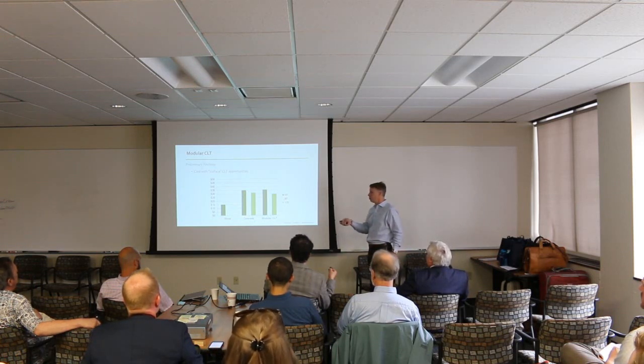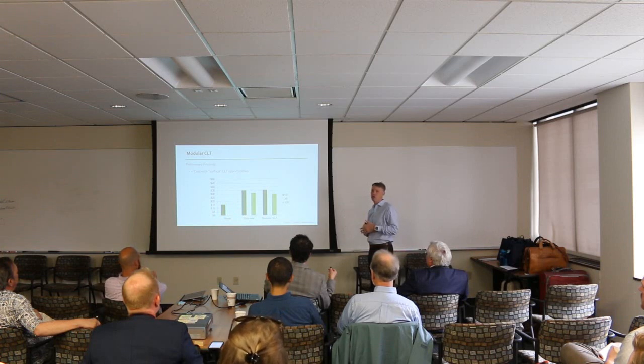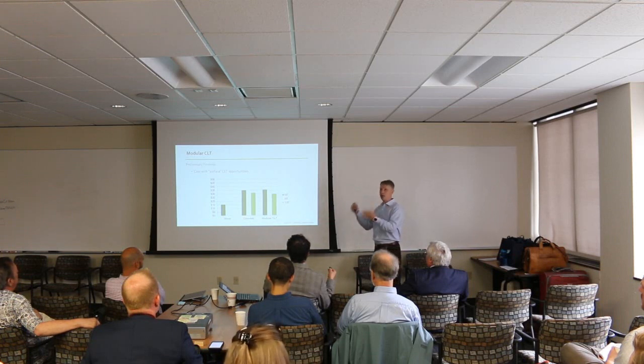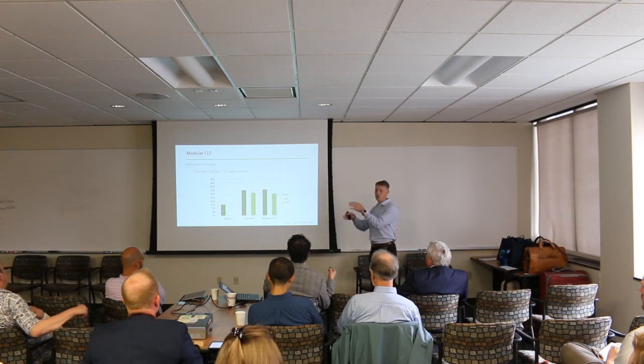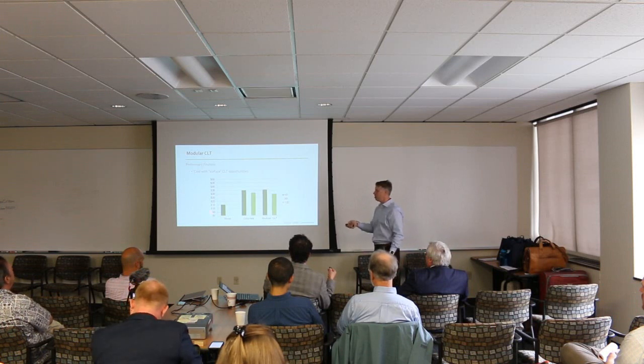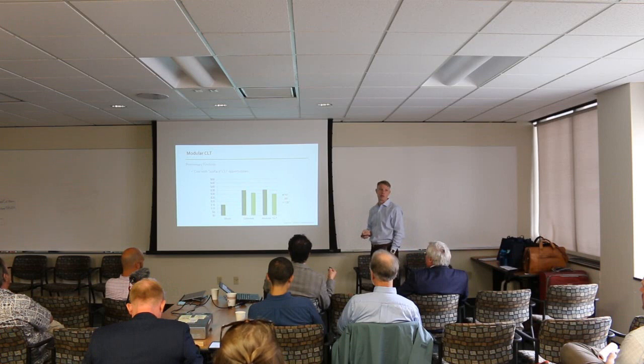The only projects where I'm looking at competing against the wood frame projects, the light frame projects, are the ones where we panelize the walls. That speed of construction, we can panelize the walls, and then instead of the I-joist plywood, slow construction of the floor system, we're slapping the floor plates on really, really fast. So that's the only place that it's starting to maybe cost compare out. But other than that, we're in that concrete market. That's what we're competing against.